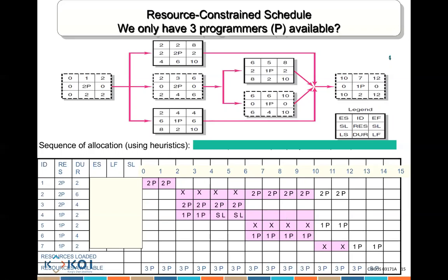It's no problem. I could start it in day 6. I could start it in whatever. And that becomes the 6 days of slack. But we are showing you the example where there's a resource constraint. And because there's a resource constraint, things cannot just start at any time. You need to look whether you have resources available.